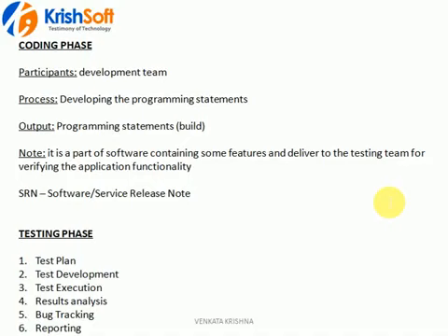So the last phase in testing is reporting. You need to report every day, weekly or monthly to the customer what is happening on his application: how much is working, how much is not working, what bugs we have raised, whether those bugs are retested, and what functionalities are working or not working. Everything you need to update to the client on a daily, weekly and monthly basis. That is taken care of by the test lead in your project. That is reporting.